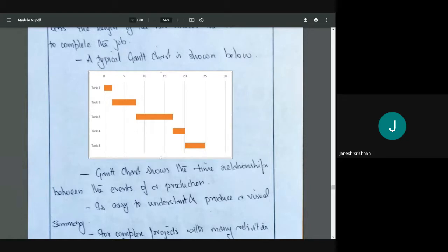So in our terms, say we need to build a house. We are going to excavate. Only after the excavation is completed can the concreting person come, and the PCC be laid in the foundation works. Before that, we need site clearance. Only after the site has been cleared can we put in the layout, and then we can do the excavation, the trenching. So task 1 is site clearance. Task 2 is trenching, making a hole, the foundation earthwork. Task 3 is laying the foundation works.